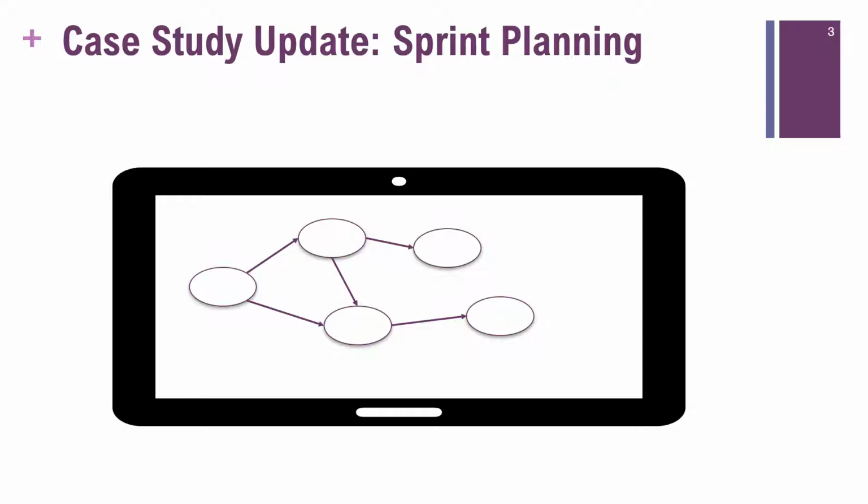A number of diagrams are sketched onto a whiteboard demonstrating various scenarios that might occur. Names are written under various tasks and priorities as the team considers the challenge in front of them. Throughout this process, Sophie keeps everything moving forward so that the Scrum team completes the sprint planning process. She's careful not to direct the development team to include certain items or plan their work in a certain way. Her role is to facilitate, not to direct.